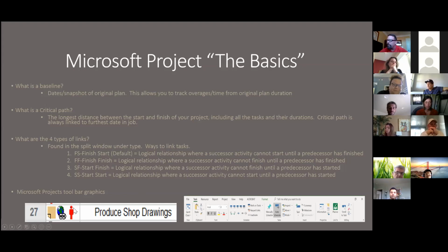One of the things you'll notice in a project schedule is you may see this little red guy over here. What that indicates is when a task is over allocated to a single resource. Walters and Wolf doesn't do a lot of resourcing, manpower resourcing, with our projects, but that does give you an indication that something is overloaded and over allocated for manpower.